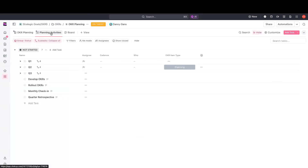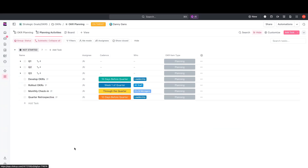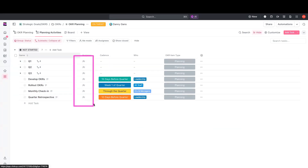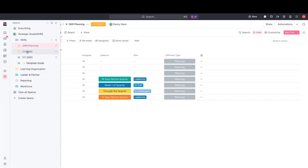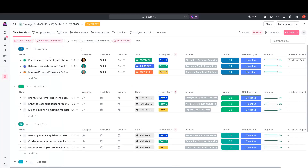Let's take a look at how you can use list view to plan your activities for OKRs. This is the list where you would develop the OKRs and plan on how to roll those OKRs out across your team. You can set up a recurring meeting for monthly check-ins and then have a quarterly retrospective, as we were just discussing in that example for the doc. This is also where you would assign all of your OKR activities as you figure them out and plan out the OKRs on a quarterly basis. By using ClickUp for OKRs, you won't just be able to keep track of goals, strategy, and long-term planning, but you'll be able to see how those goals translate to actual work and the progress that is made on that work throughout the year.